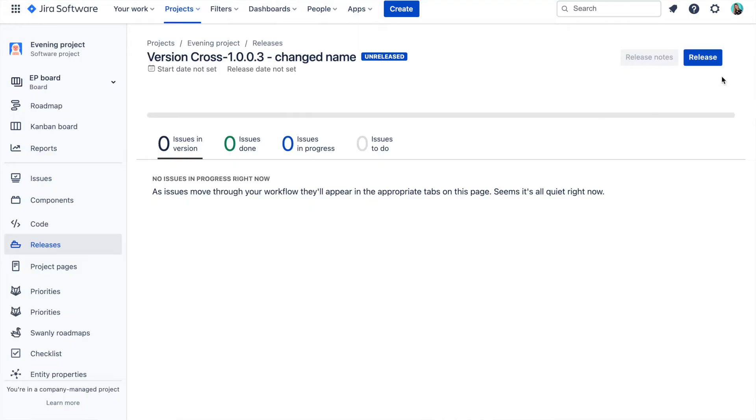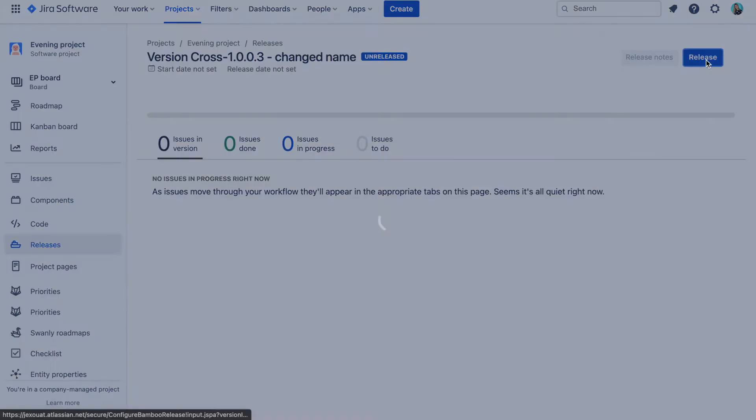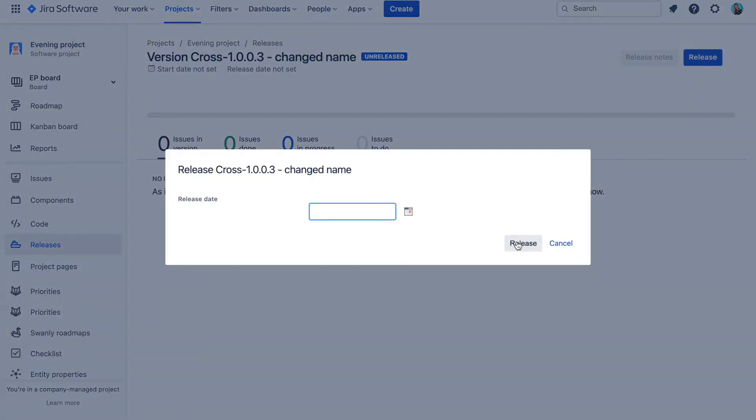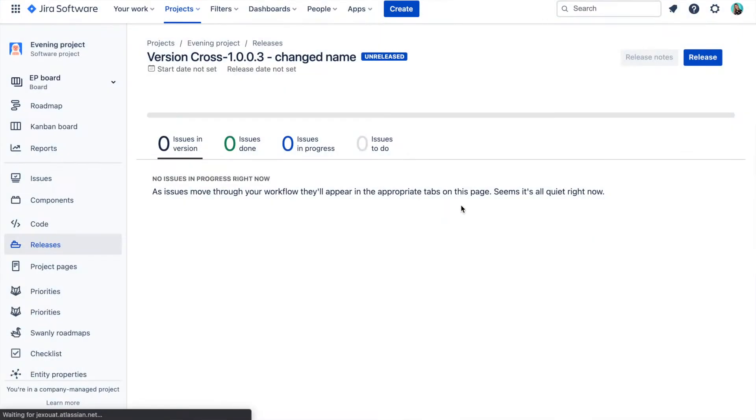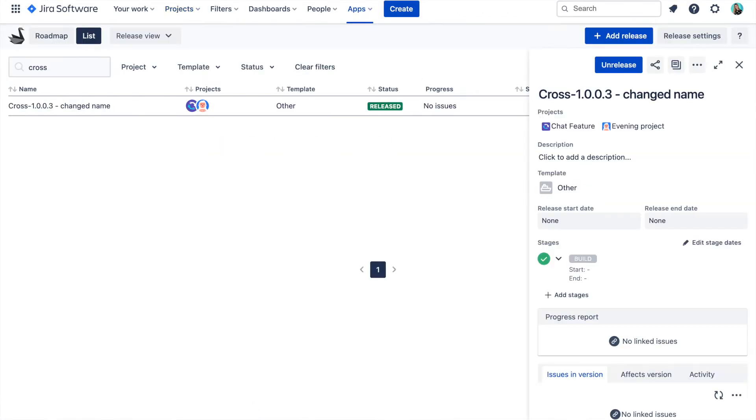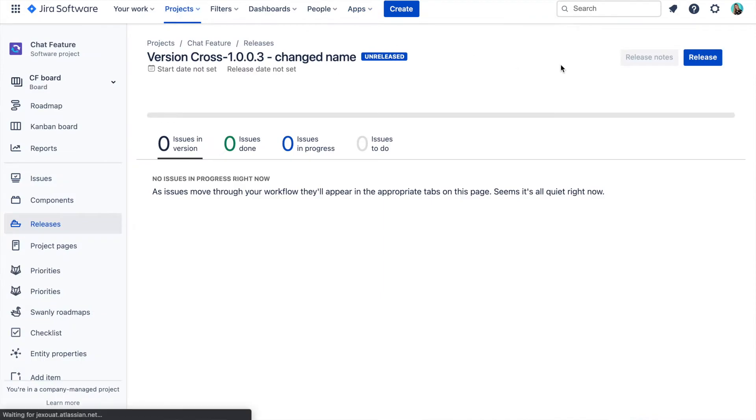And the synchronization works the other way as well. If we would go and change for example status in one of these versions in the project, then the change will be reflected in all other project versions too and in Swanly.